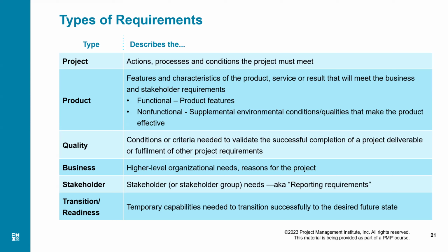Eventually we state that in, I don't know, the inspection plan, something like this, where we say, based on this frequency, based on this methodology, we are going to have this kind of competent people to do that certificate, and at the end of this it will be compiled and referred back to the requirement metrics. Yes, very right, very right.